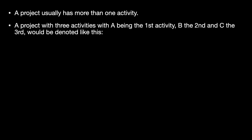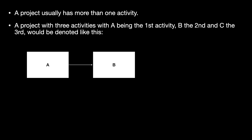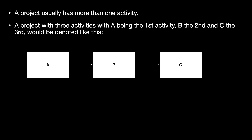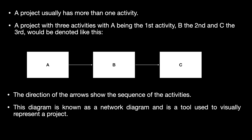Now if we had a project with three activities, with A being the first, B being the second, and C being the third activity, it would look something like this. So we have activity A, then we have an arrow pointing towards activity B, and then an arrow pointing towards activity C. The direction of the arrows signifies the sequence of the activities. This diagram is known as a network diagram and it is a tool which is used by project managers to visually represent a project.